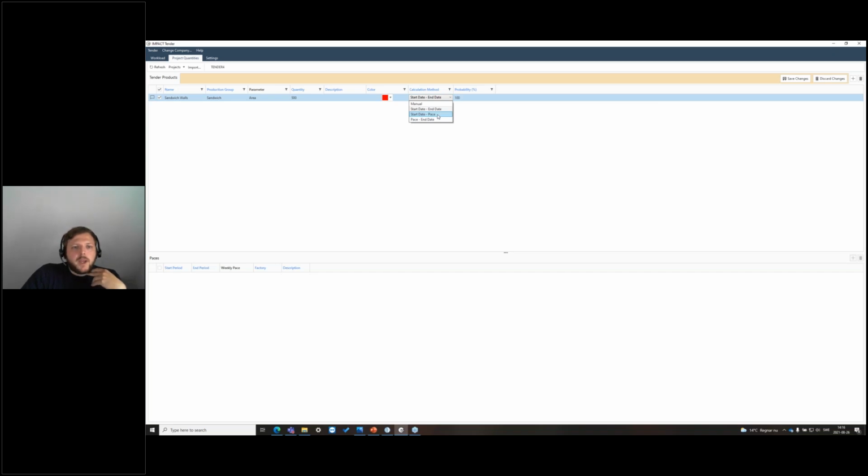The next one is start date and pace. So then you say, okay, I'm gonna start this week or this day, and then I'm gonna cast like 100 square meters every week, and then we will calculate the end date. Or vice versa, if you want to set an end date and then see, okay, I'm gonna do 100 square meters, when do I need to start? Or the fourth option is to do everything manual. So we won't do the calculation for the third parameter, but we will just put everything manual here, if you prefer that. But we're gonna use start and end date, and the probability here right now is 100%,